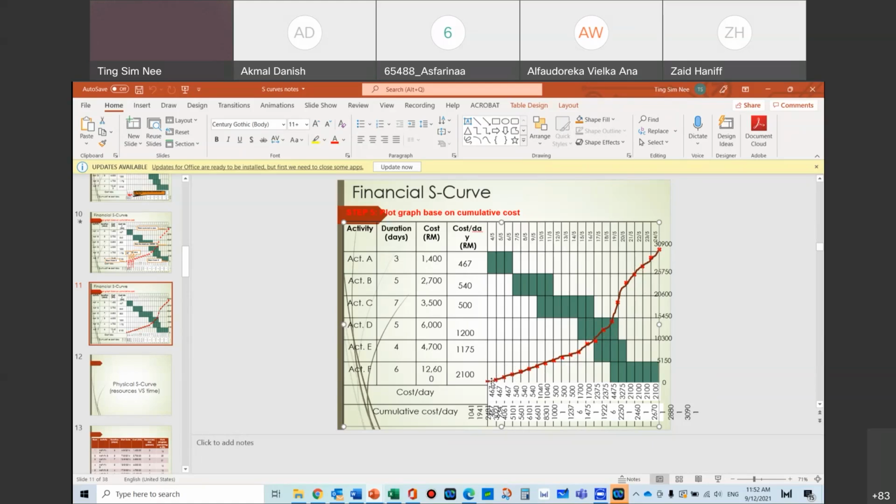Then you will know that, oh, I'm supposed to be receiving this amount from the client, but my spending will be around this amount, or I give you a higher example. So this month I'll be spending this amount, but the client should be paying me. The work done will be about this amount. I'll be spending somewhere here, okay? Then these differences is the money that you have to be forking out, because you may not get payment from the client. You don't get payment from the client every month, you see. So you will probably submit a claim after 3 months, and then they don't pay you 2 months later, or you expect them to pay you every month, but then they don't, you see.